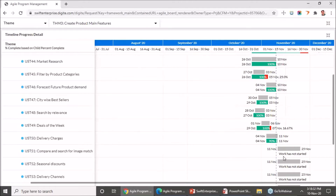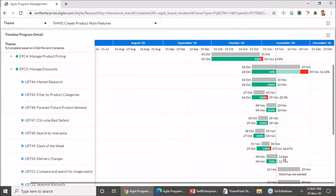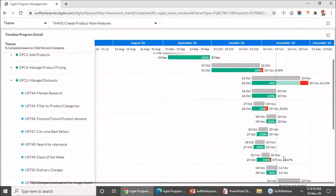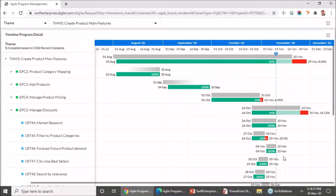If neither sprint nor release tags are present, we would need you to provide planned dates. Without a planned start or end date, providing a slippage percentage or predicted end date would be difficult, so we simply do not show any slippage in that case. But apart from that, you will still be able to see the progress as work items advance based on percent progress. What we have also done is try to make this more accurate in terms of how the actual start gets derived for all these items.